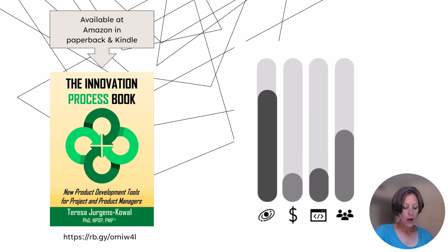Stage 2. When an NPD project, standing for new product development, passes gate 1, it moves into stage 2 of the waterfall process. Stage 2 is focused on testing initial product concepts to validate the market opportunity assumptions of stage 1. Approval of gate 1 also means that the NPD team has presented an acceptable go-forward plan for stage 2, including budget and schedule. Based on the customer needs identified during scoping, proposed technical solutions are formulated.